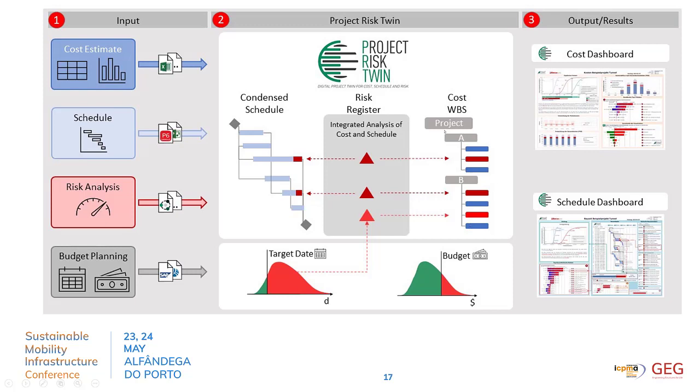Now the schedule and the WBS is completed. So we can now simulate the WBS with all the components in here. And we get now the information in a curve about the total project cost, the cost potential of the project. And as seen before, we can now evaluate our budget, how likely we're going to exceed it or not exceed it.